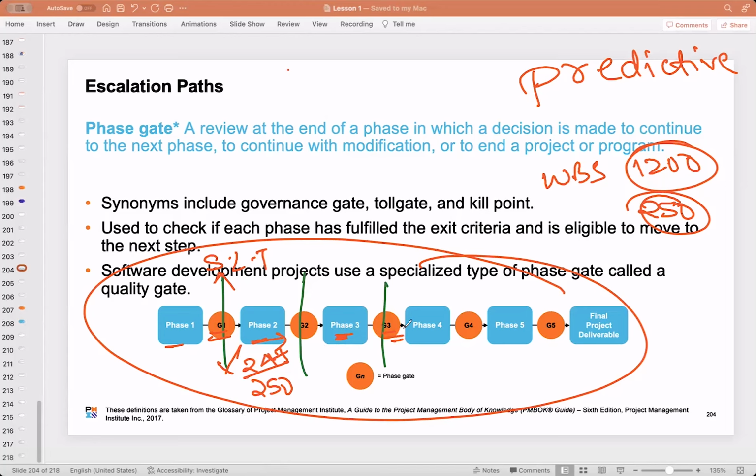So this is something which is connected with our funding limit reconciliation. Do you remember that concept? Funding limit reconciliation. I told, no, the whole big project budget will not be handed over to your hand on day one. Instead, for phase 1, this much money you can spend. And once you do your phase 1 properly and they get a feel that you did it properly in gate 1, then only you can think about phase 2. Is that clear? The next round of money you will get only at the gate. This is the speciality of this phase gate process.